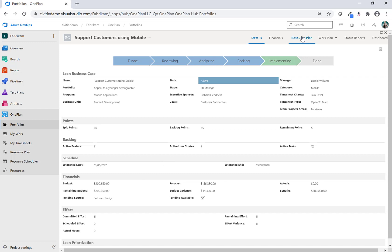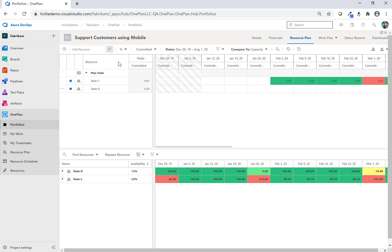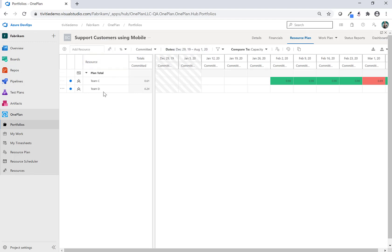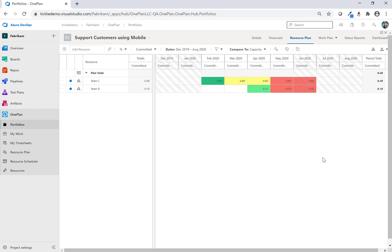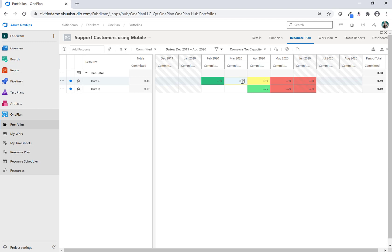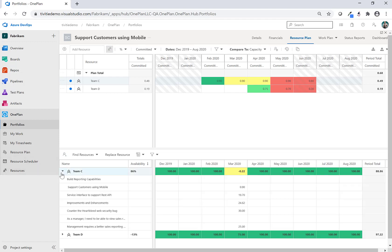In this scenario, if this is a brand new epic and we wanted to evaluate whether we should prioritize it into execution, the first thing you might want to do is put a resource plan against this epic — these are the types of teams or individual resources we need. Here you'll see we already have Team C and Team D planned on this particular epic. Right now we're looking at a week forecast but I'm going to change this to a month to give us a little more range. By month you can see the allocation by team — we need Team C at 90% in February, almost 90% in March, so I'll round that to 90. We need 75%, then 70%, then 30% of Team D. You can add additional resources or teams, and you can open these up to see what other epics these teams are assigned to as well.